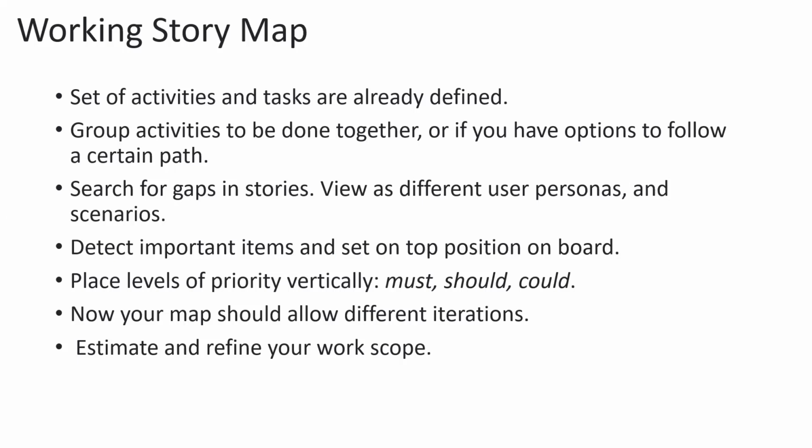It helps in understanding and defining the project goals, the sprints well. It establishes a relationship between different stories. It helps them in doing the prioritization of the story. It helps in identifying the dependencies on different stories. Right? There can be a dependency. For example, story 2 cannot be completed unless story 1 is ready, right? Or story 1 and 2 are the activities that can be done together, right? Simultaneously. So such level of task level, which is the story level identification, is very, very important.